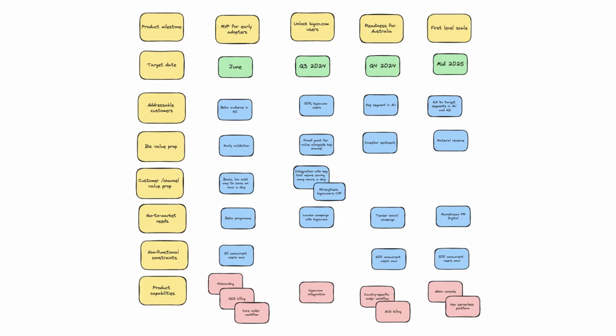Now, in the process of doing that, what tends to happen is you're actually splitting them and then suggesting back what those milestones might be. So it's kind of a straw person thing, right? You're saying, I've heard you, and I think what you're saying is that we're going to unlock this value, then this value, then this value. And if your stakeholders go, no, that's not valuable, that's not what I mean, you go, great, let's try a different version of that. And you just keep working around until that set of milestones is clear.